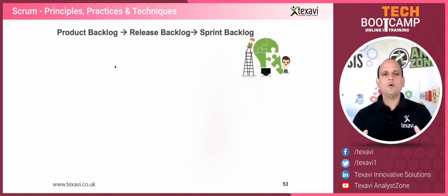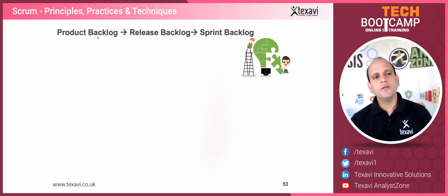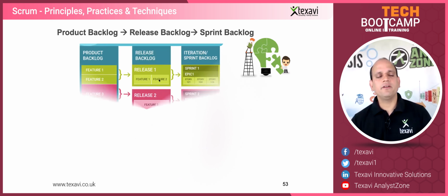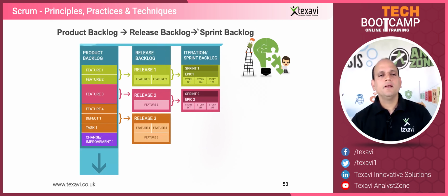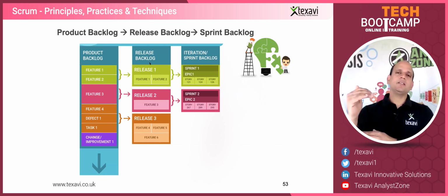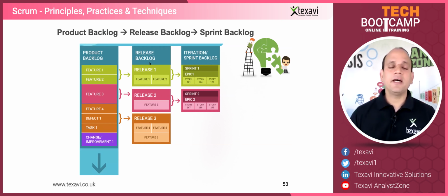And then we had to look at the product backlog, the release backlog, and the sprint backlog, right? So release backlog is not something different. It's a term that I like to use because you actually have a better idea in terms of the releases. Scrum just says product backlog and sprint backlog. There's no release backlog in Scrum, but this is my way of using it. So the product owners could actually come up with a release, so the team has a better idea as to what they're working on, which direction they're going.